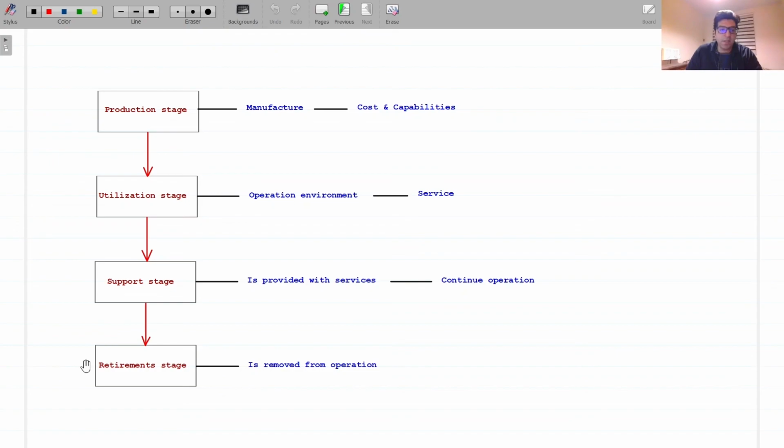The retirement stage is where the system and its related services are removed from operation. SE activities in this stage are primarily focused on ensuring that disposal requirements are satisfied. Planning for retirement is part of the system definition during the concept stage. Experience has repeatedly demonstrated the consequences when system retirement is not considered from the outset. Early in the 21st century, many countries have changed their laws to hold the developer of a SOI accountable for proper end of life disposal of the system.